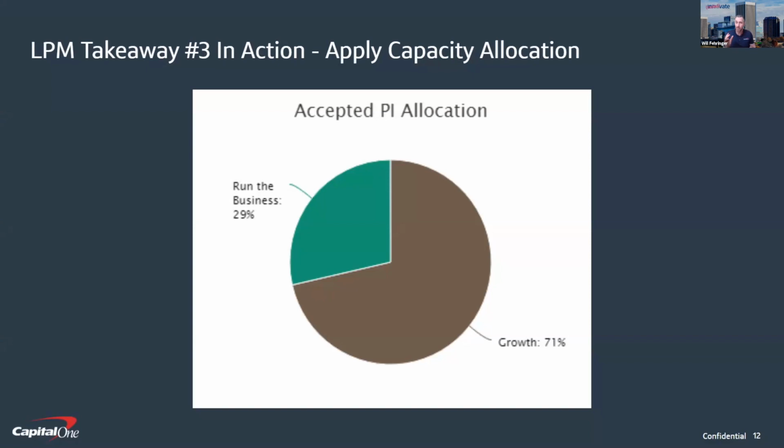It's dependent on the epic. The field is on the epic, and then anything that rolls up to that epic will get categorized in that particular category. So it's fairly seamless in the sense that if you're making those connections correctly and setting the right field at that epic level, then the report will generate automatically for you. Yep, it depends on the maturity of the epics in Jira. It depends on whether we're linking the right objects to the right features, for example, to the right epics in Jira Align, and so on and so forth. But yes.